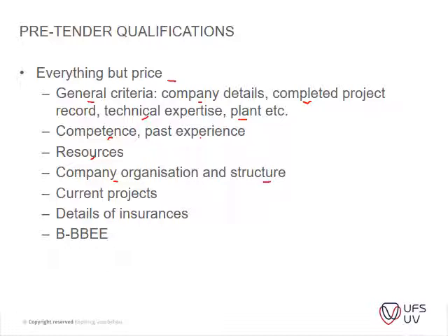And then in many tender documents, your current commitments are also asked for. So sometimes it might be neck and neck between you and another company, but it might be a situation where you are a bit overcommitted at this stage, so you might not be able to do the work in the next few months. Then it would be better for the client to rather give it to someone that doesn't have that much work.